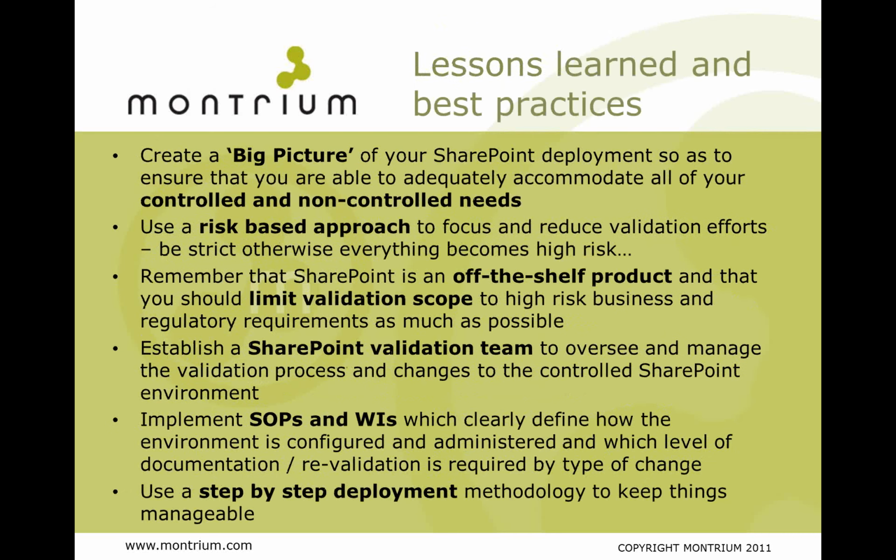So to finish up, some lessons learned and best practices. The first thing that I would strongly recommend is create a big picture of your SharePoint deployment so you can get a long-term vision of what your company wants to use SharePoint for and how you should structure it into controlled and non-controlled spaces. Use a risk-based approach, of course, but be very strict because otherwise everything becomes high risk. Remember that SharePoint is an off-the-shelf product and therefore you can limit your validation scope.